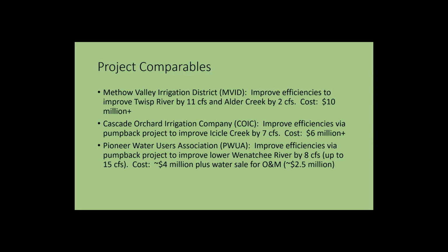We're having this exact conversation in the iSchool work group about how much it costs to build a project, where the funding comes from, how we can count things as match, and how we can leverage funds. What we're finding in that exercise is that when we report costs, like in a surfboard report, we are underrepresenting the total cost of actually doing the project. If I were to count the 10 years of work we've done with Wenatchee Chihuahua Irrigation District to get where we are now, the cost would be a lot higher, but we typically don't include those costs.